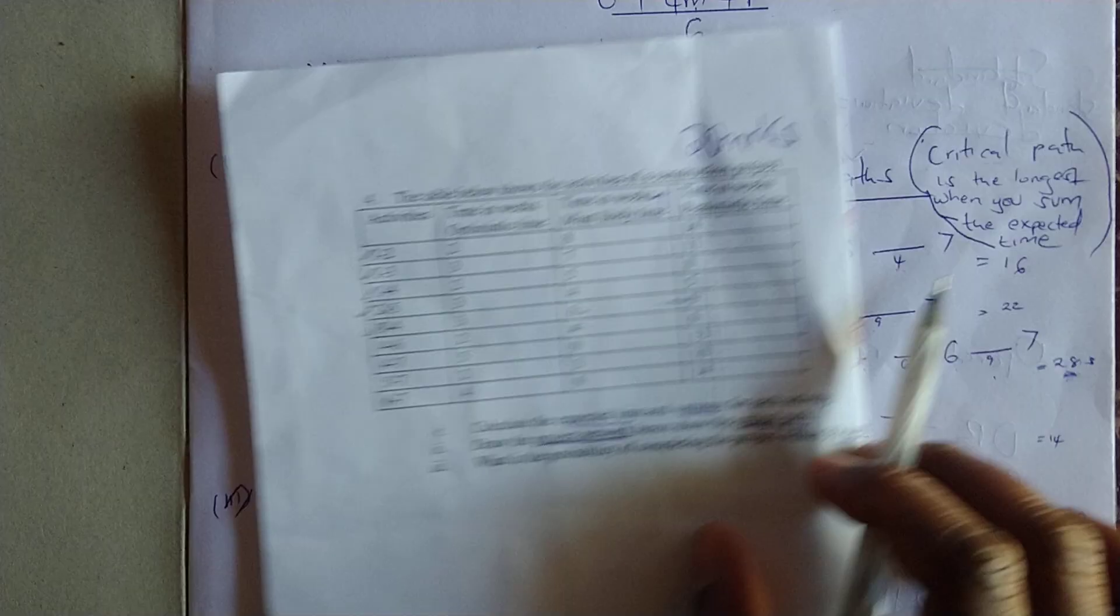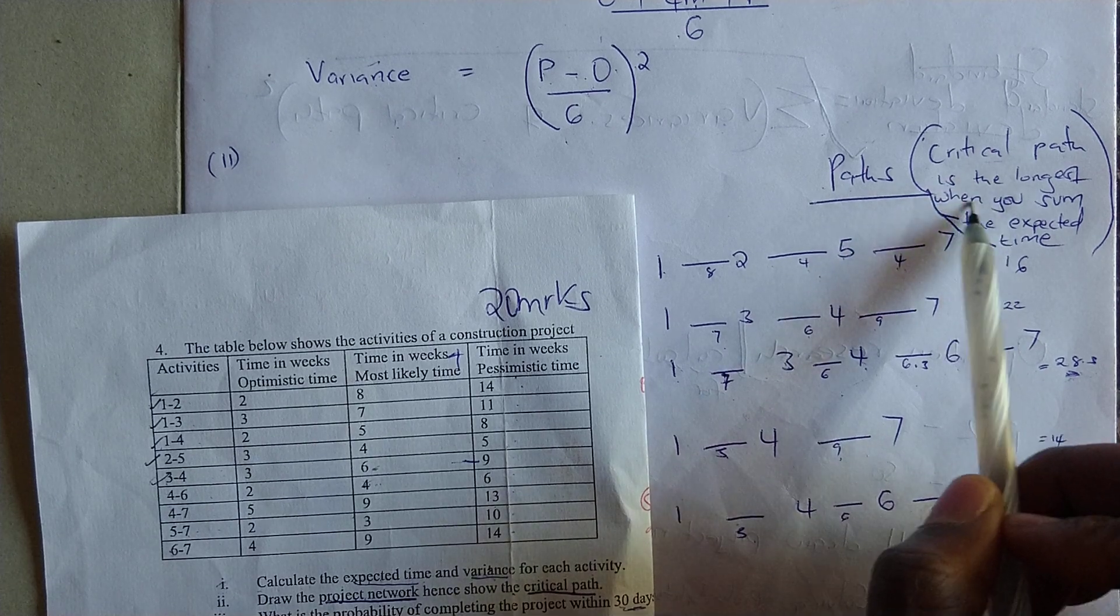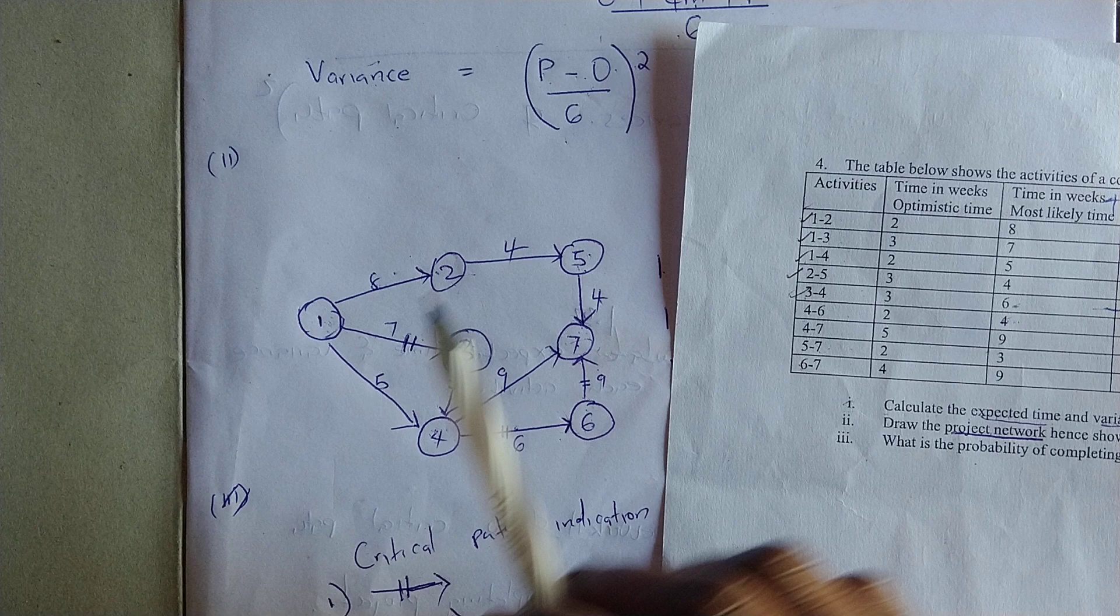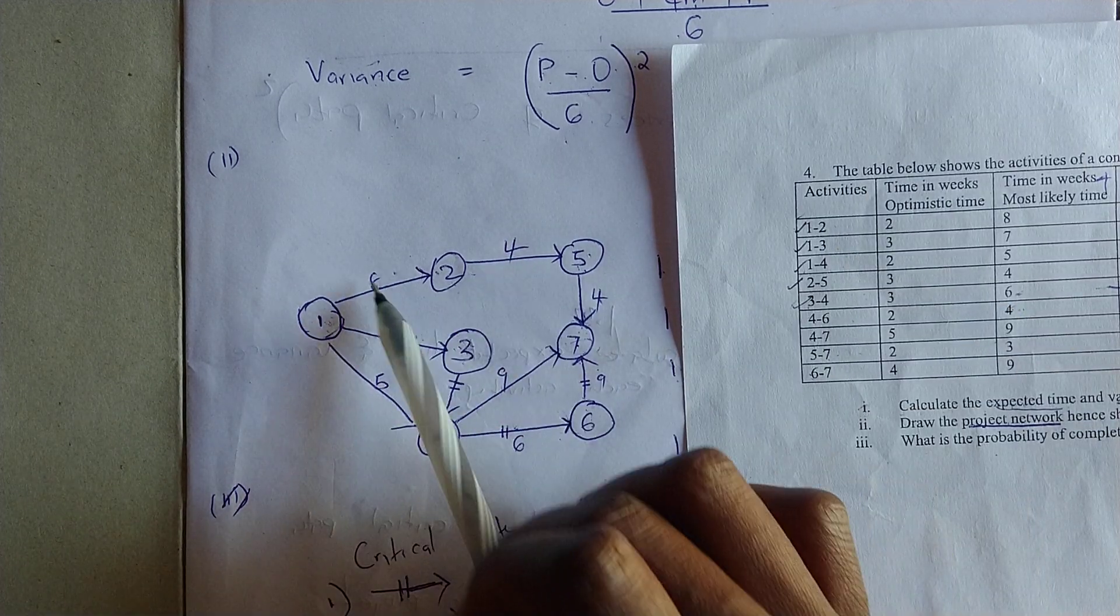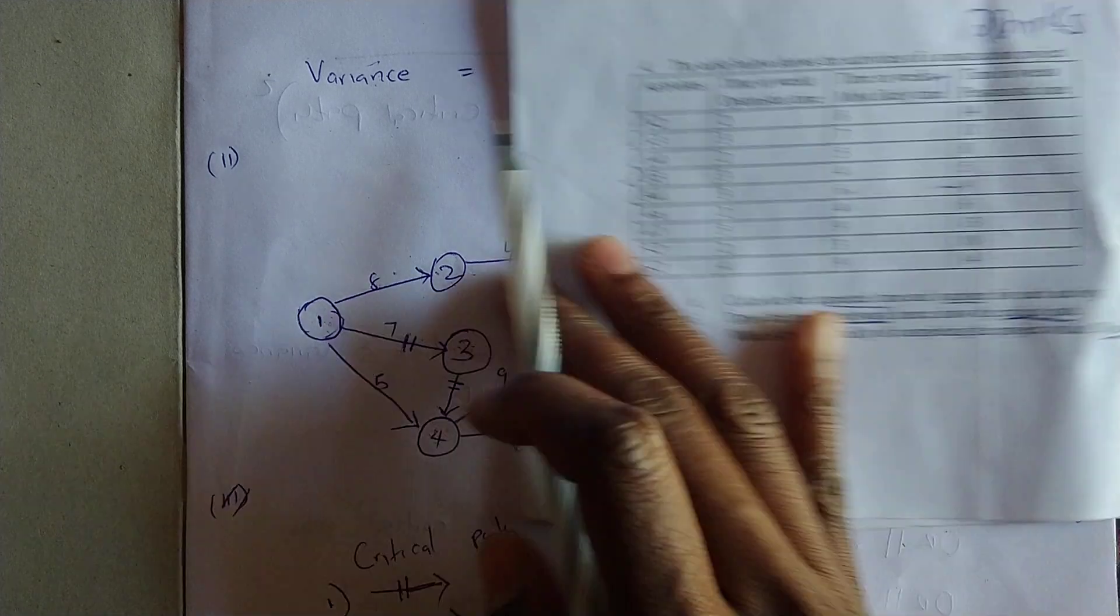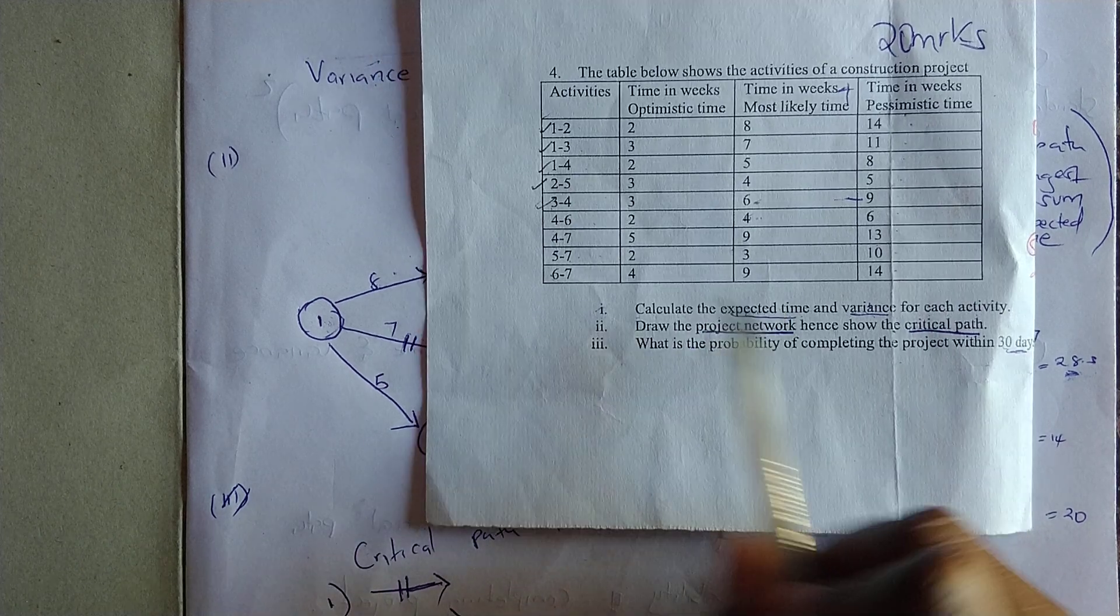The critical path as indicated here is the longest path when you sum up the expected time. I forgot to mention, these eight, seven, and others are the expected time. Please note these are the expected time that we had previously calculated. We're going to indicate it here.